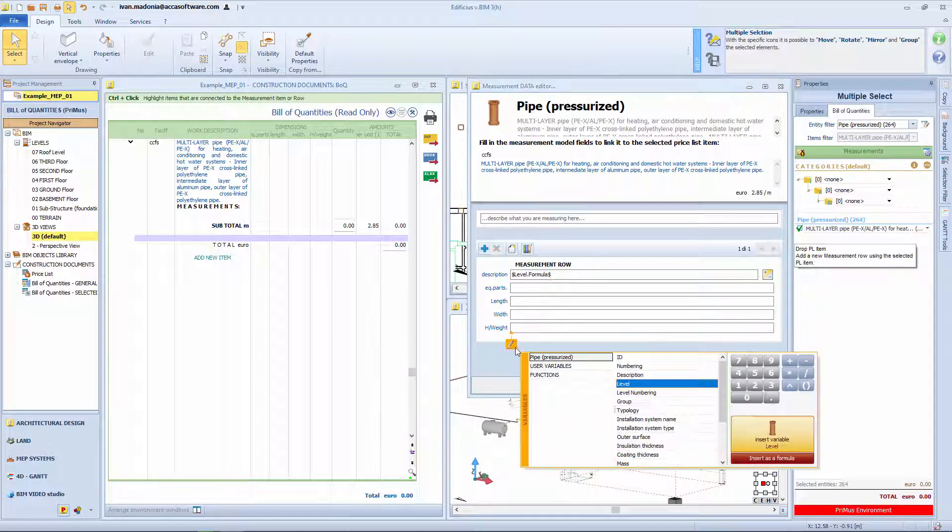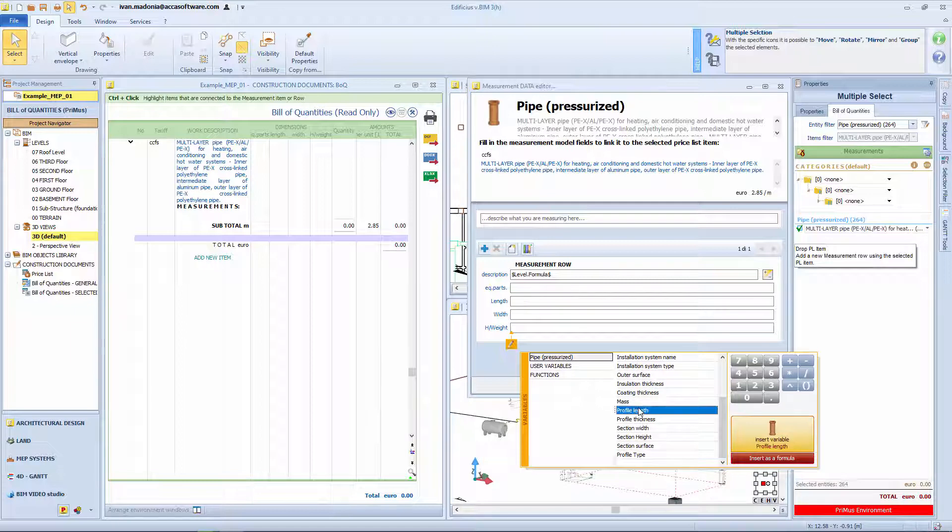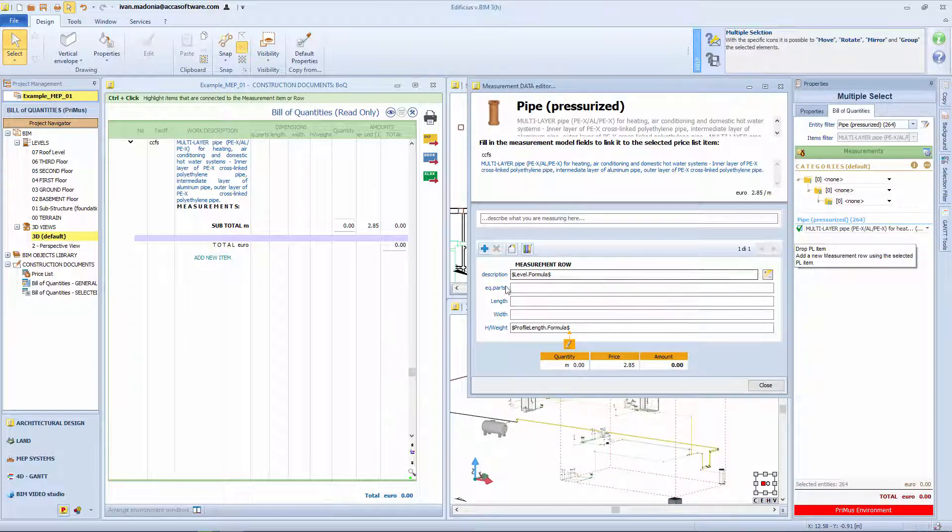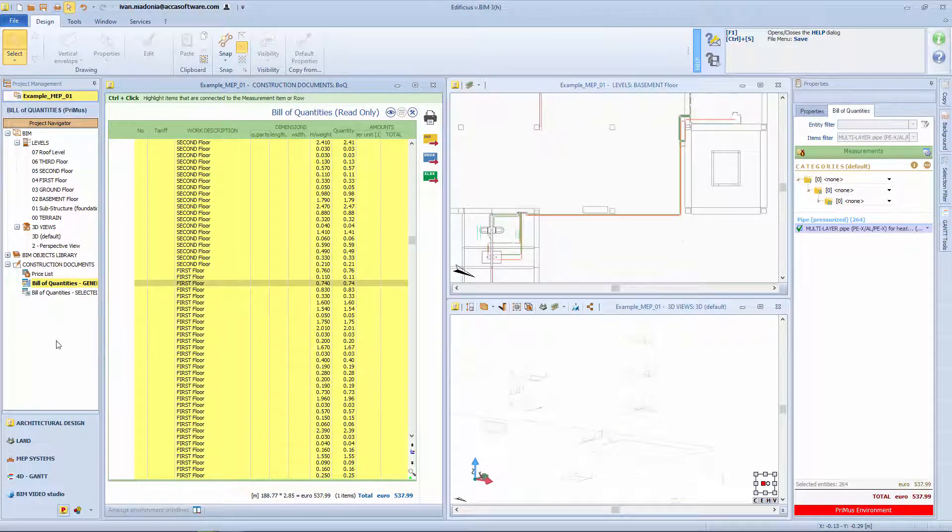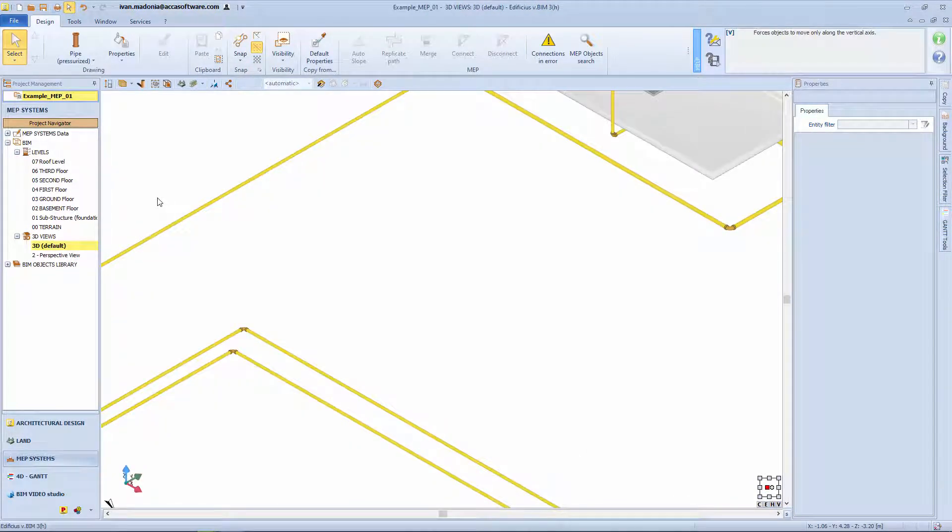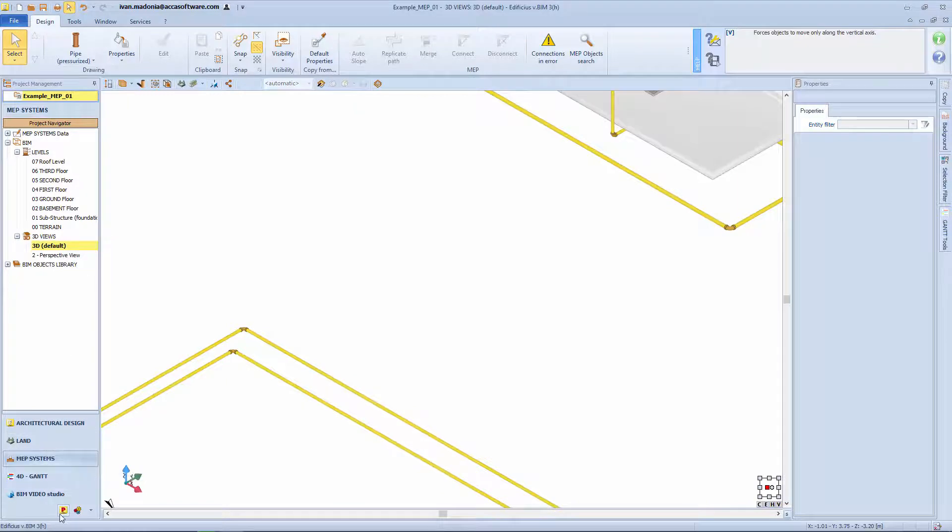If necessary, you can also establish a formula to automatically associate quantities to elements. Should you need to make any changes to the model, the estimate is automatically updated dynamically.